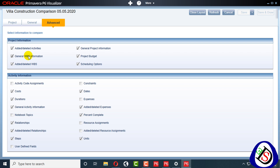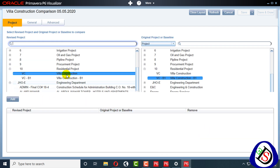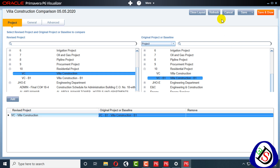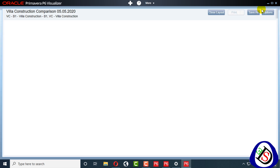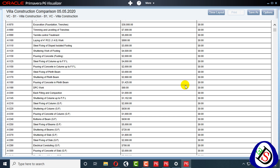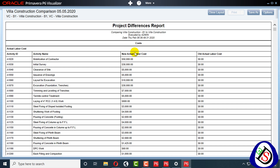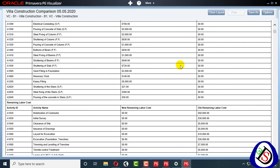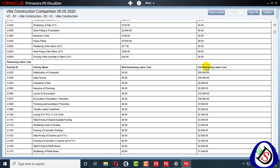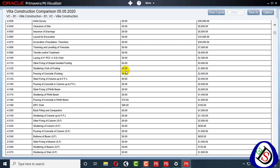I don't need constraint information, activity code assignments, notebook topics, general activity information, add/delete general WBS information, general project information, or project budget. I have selected some cost and duration fields and deselected others. I'll go to Project, and with both projects added I will go to the top and Save and Draw. It is now drawing — showing actual labor cost comparison: new actual labor, old actual labor, no difference; new remaining labor and old remaining labor are 50,000, and the new one is zero for these activities.